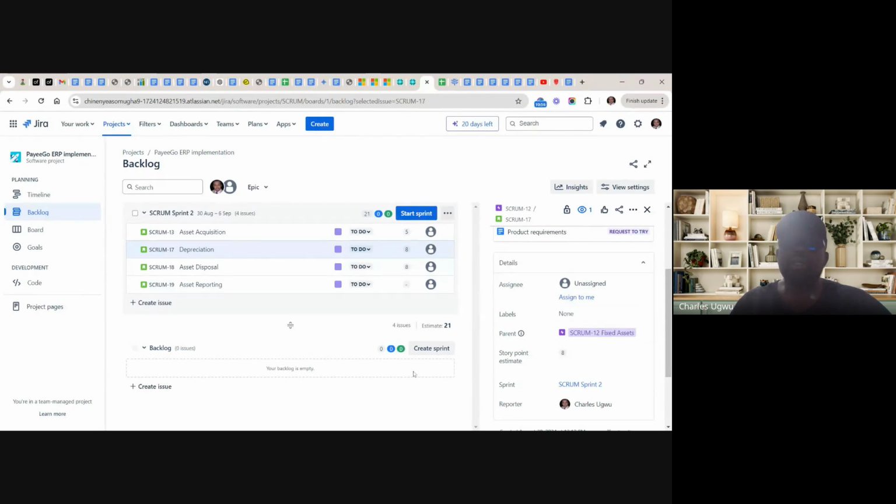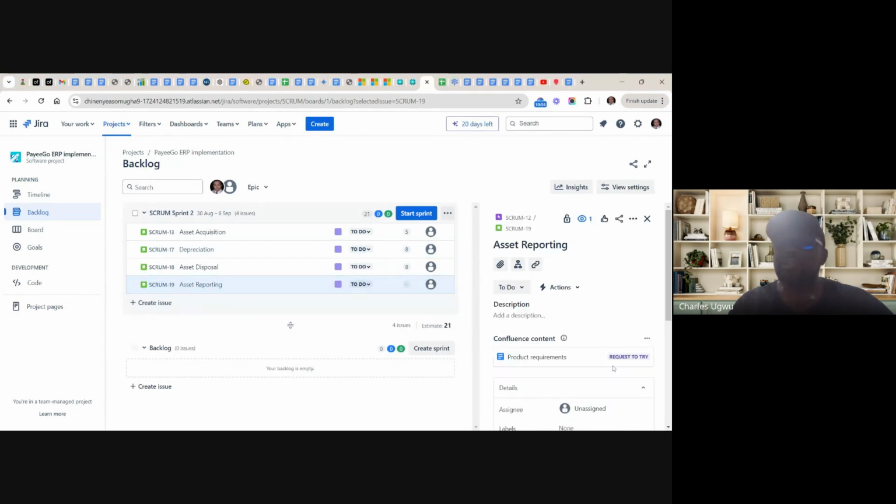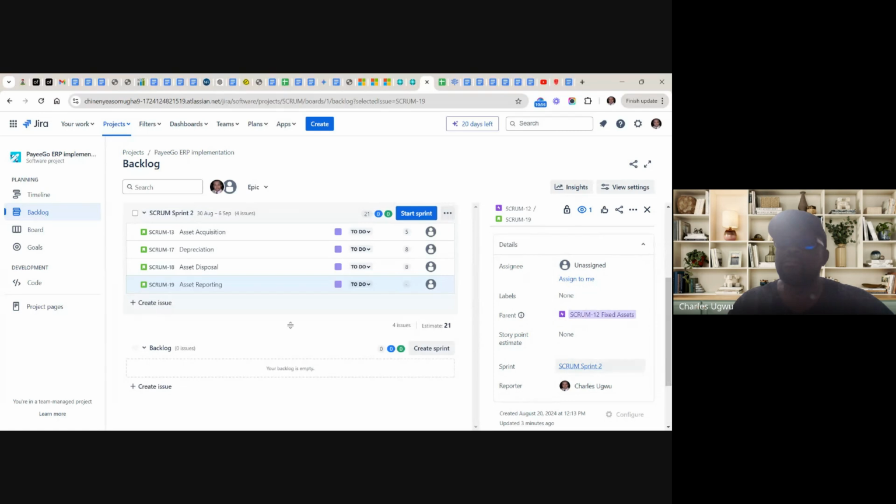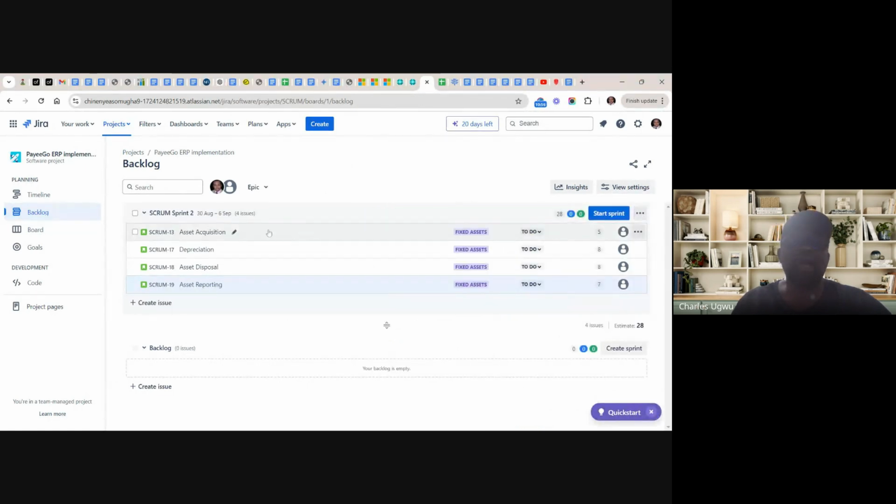Actually, what I'm doing here is what we're supposed to do in business analysis also, but let me just show you briefly how this works, because we're still going to do it in business analysis. So you see, this is how we plan. During the planning, we'll try to understand how complex every work item is by giving them story points. At the end of the day, we understand the amount of work we have committed.